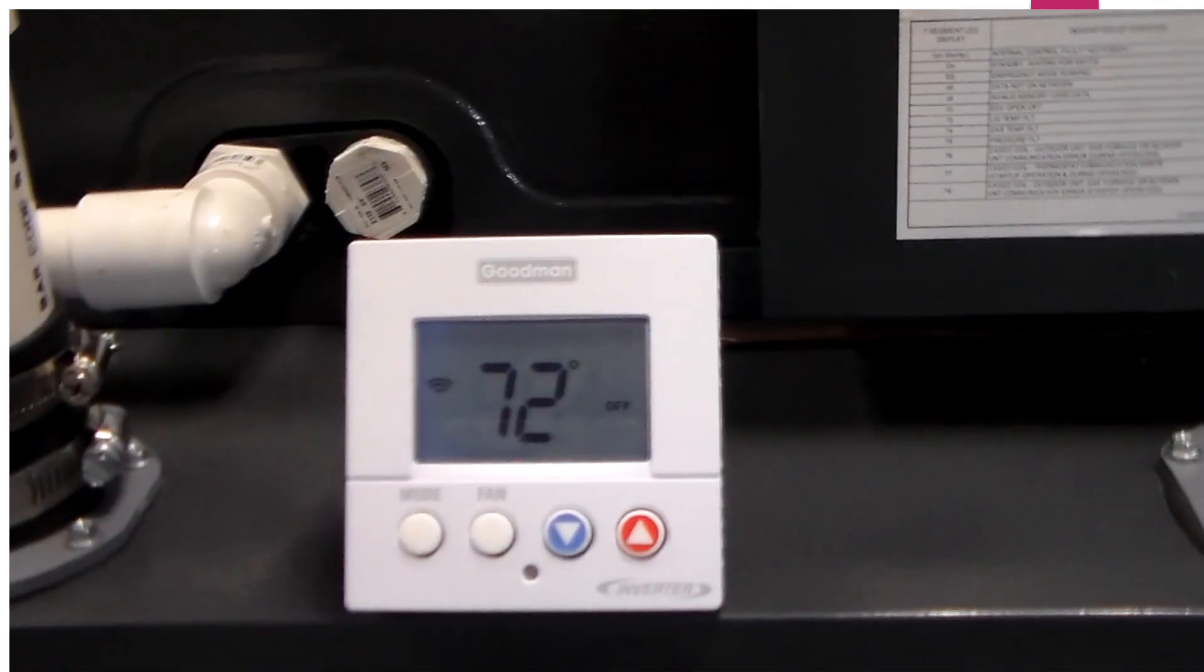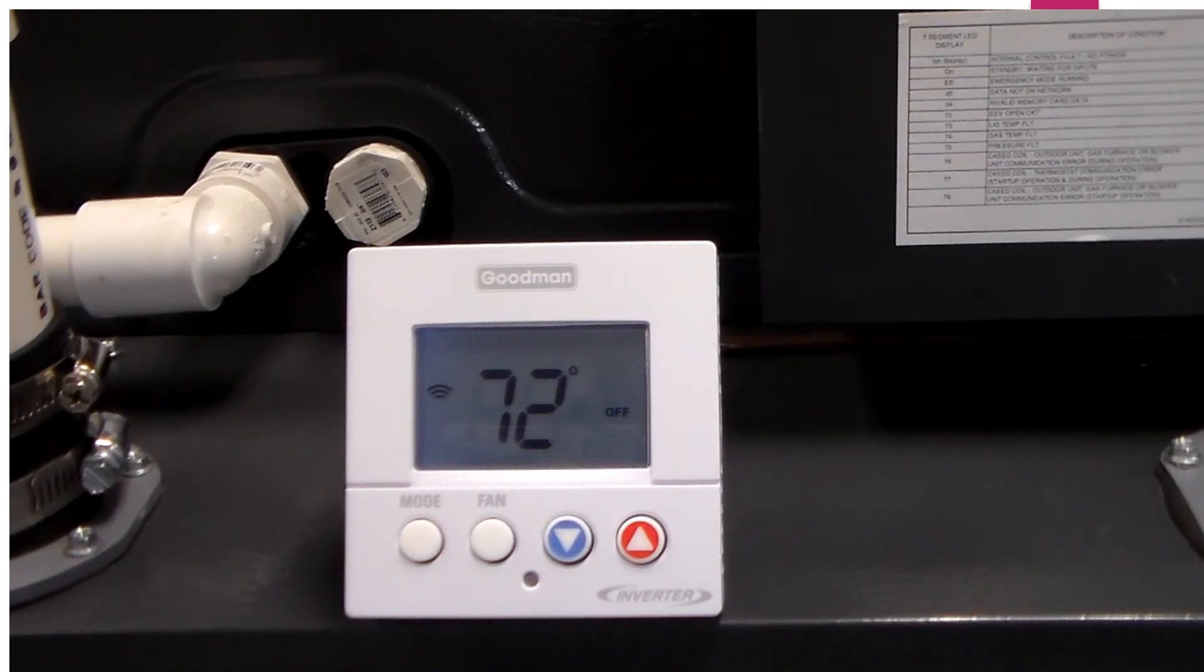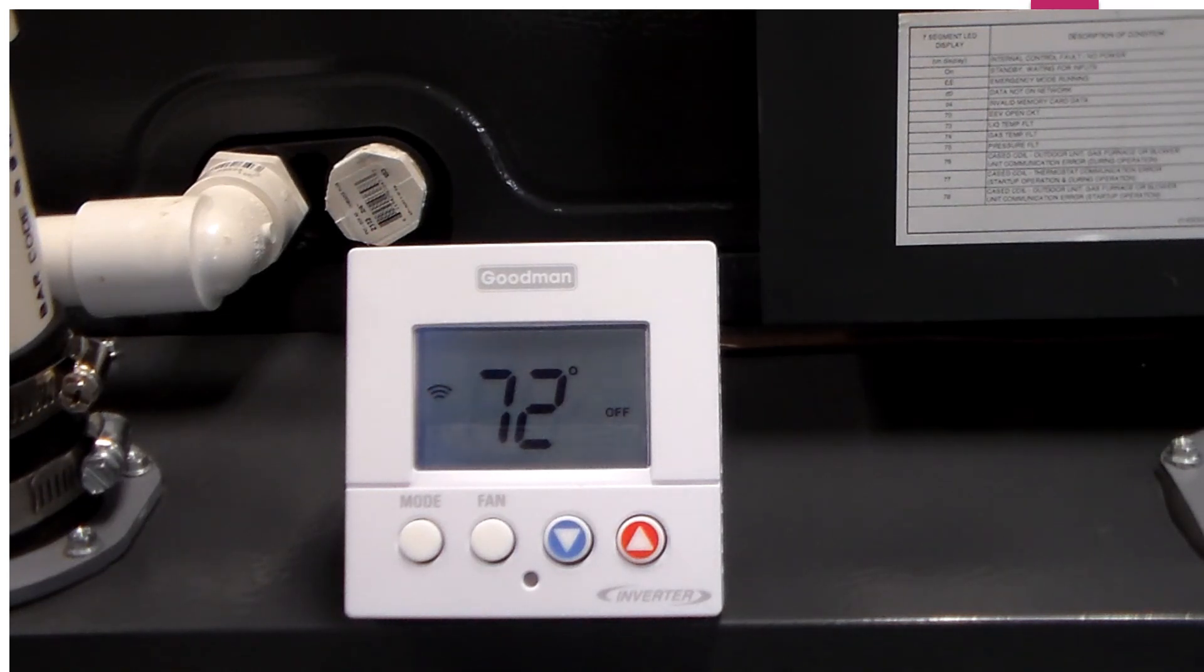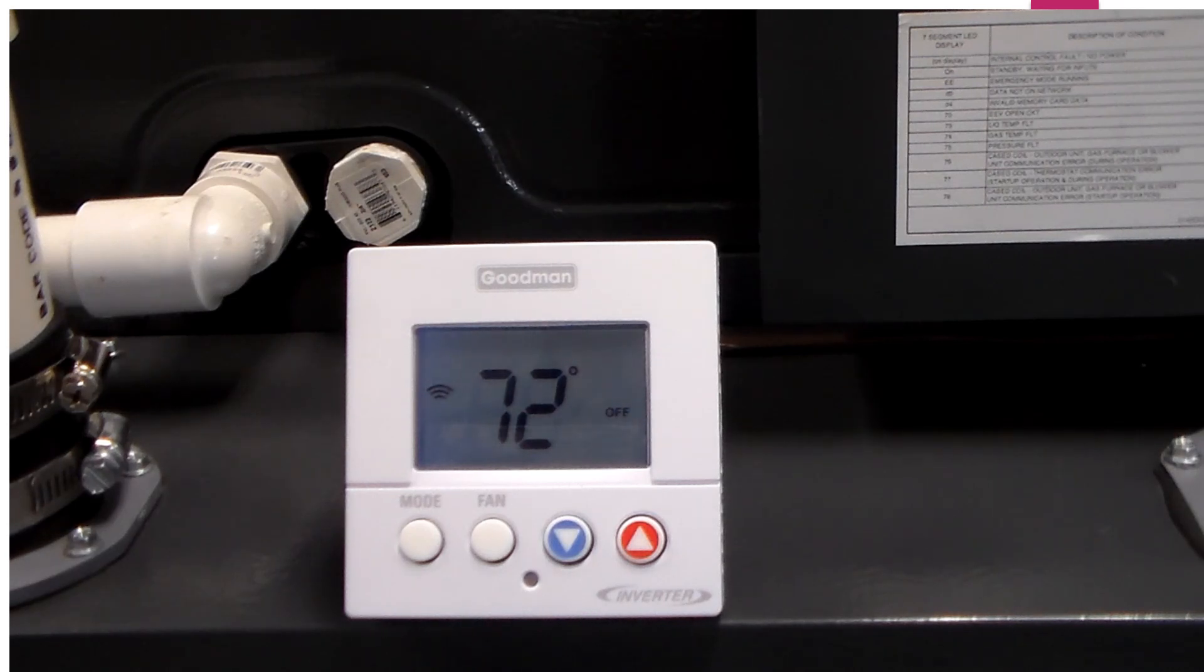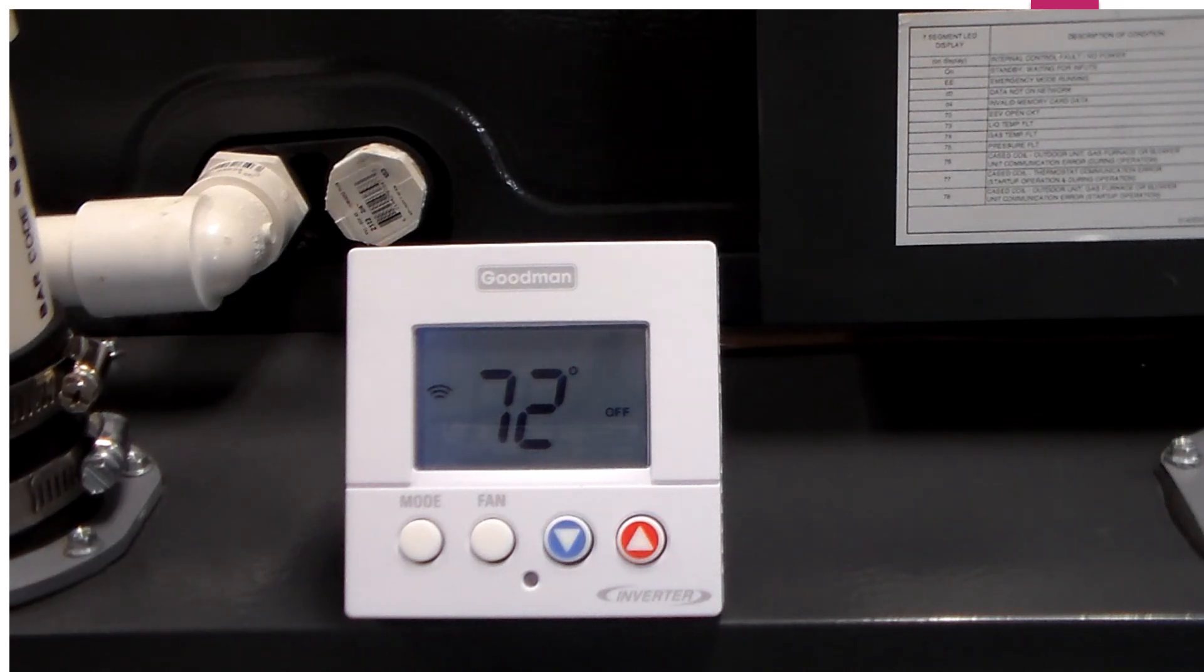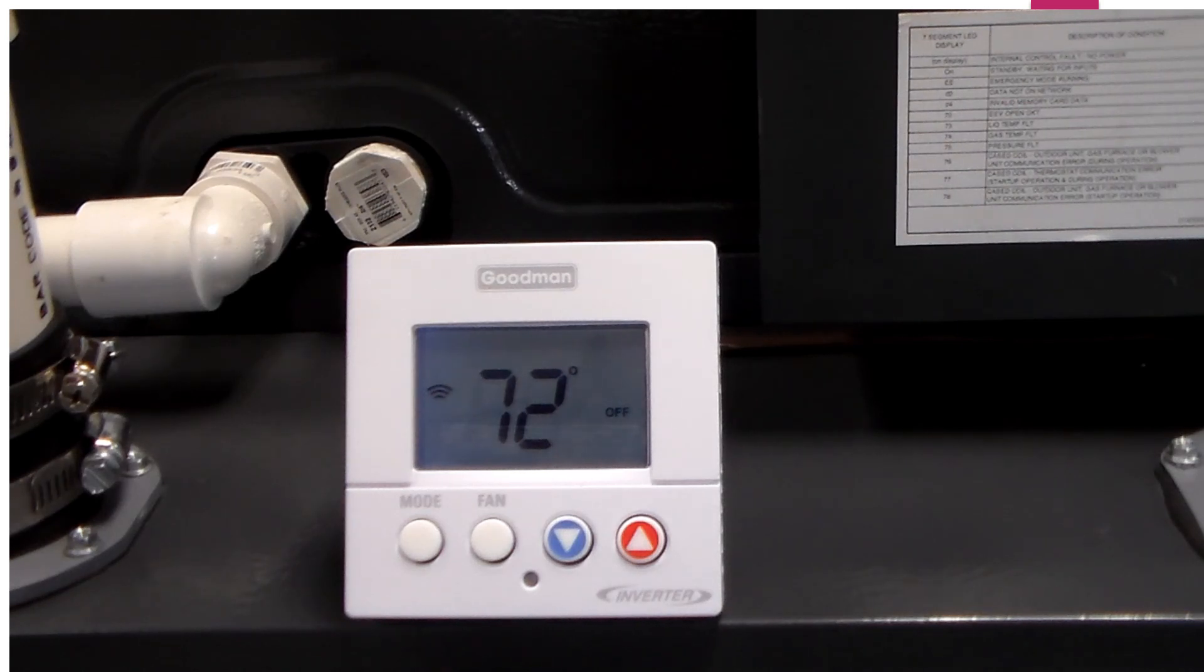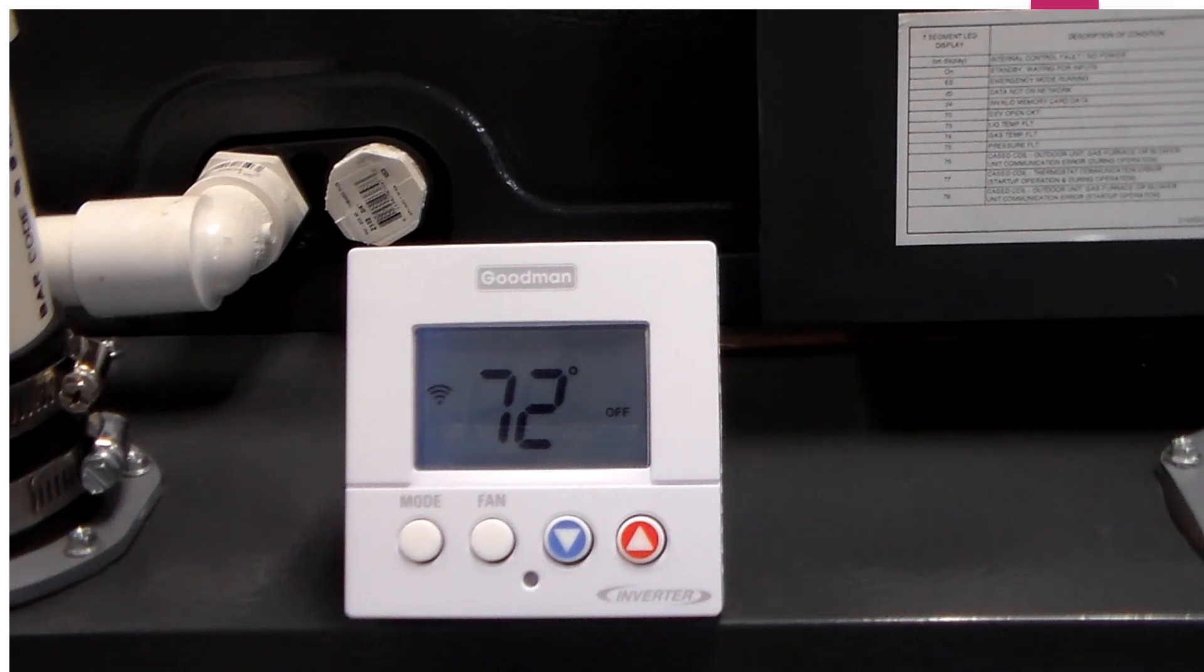Now that we have completed our system profile, it's time to commission this unit. Any time that you start up a new Goodman inverter system, you will need to run a test mode. If you do not run a test mode right away, you will get an E11 error code any time you try to use that equipment. It will not allow that system to run until a test mode has been initiated.